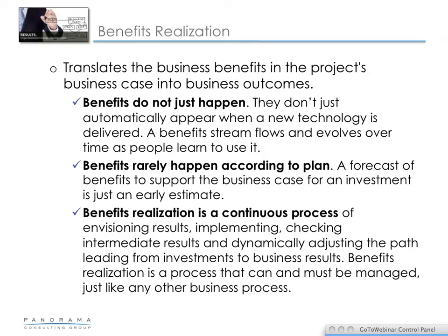And actually, there may be new benefits that we will identify during that entire process. So in the OCM work stream, we make sure that we monitor that so that in the end, the business benefit is in fact handed over to a business owner, and we then conduct post-go-live audits to make sure that the benefits are being realized.